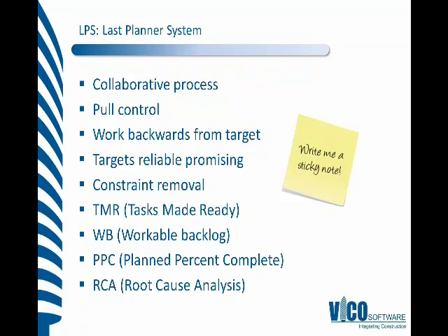And when we're putting the Last Planner target schedules together, as far as the phase scheduling and how we would go about that social process, we start with some sticky note exercises, and we start at the end of the program and work backwards. It's amazing how starting from the end and working backwards really does help us to ask more questions, and it's all about releasing the work.